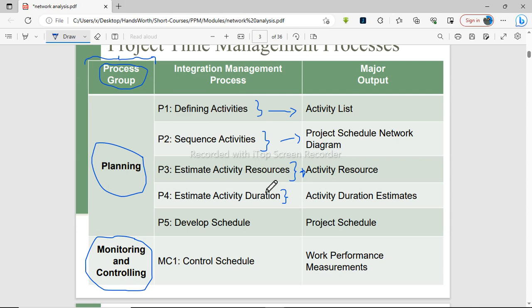Yeah, but I'm sure you get what I mean. So after you are done digging, you estimate, then you also list the other activities that will follow, such as plastering. Then you also indicate, okay, under plastering, this is how long it will take.